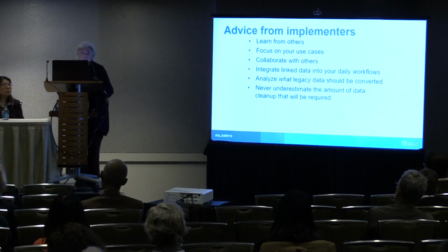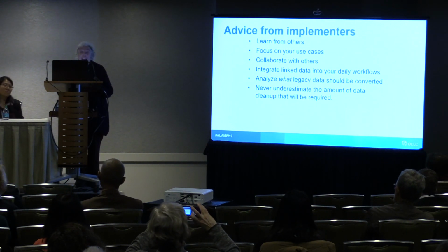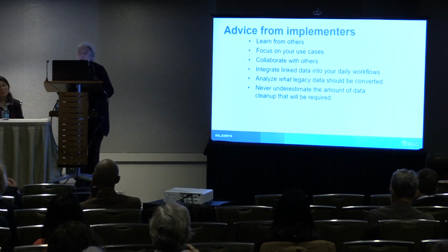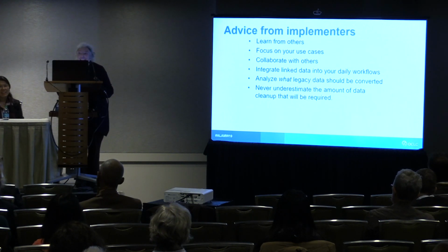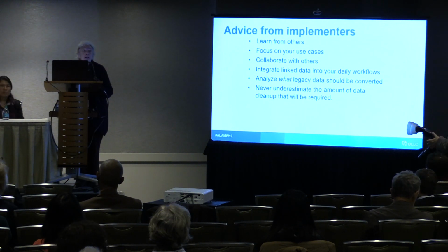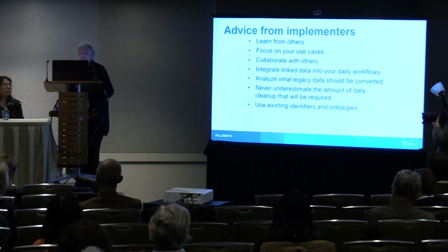This one's an important one. It's repeated over and over again. Never, ever underestimate the amount of data cleanup that will be required. I'm sorry, guys, but the data is just not perfect. And as Kevin said, he's not sure it'll ever be perfect. Well, there's a lot of work, and I do think that is one of the main things that any project manager underestimates: the amount of data cleanup needed.